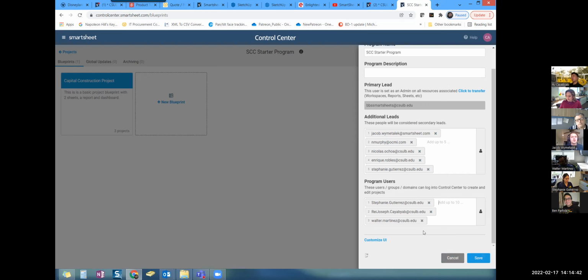For sharing permissions, it'll take default sharing. If you want to share to select individuals or share specific templates, then you don't want to. Weirdly enough, once Control Center creates a project, you have to share things individually afterwards. I'm not sure why it's like that. It just is. And the other reason is, if there are certain projects that are approved but not in flight yet, and you didn't want to create them via Control Center, then you would just select what project you're going to create. But realistically, we can easily set up auto provisioning for you. So it can do either. I can either create a project, or it'll just do it automatically.